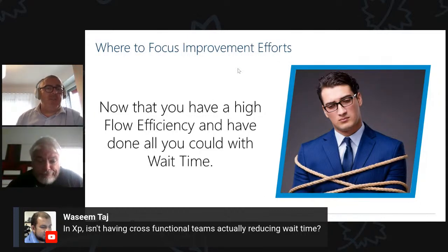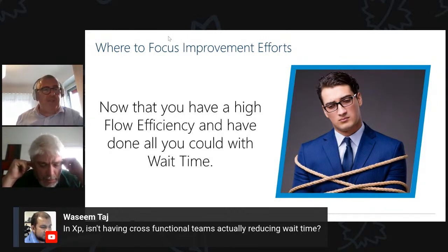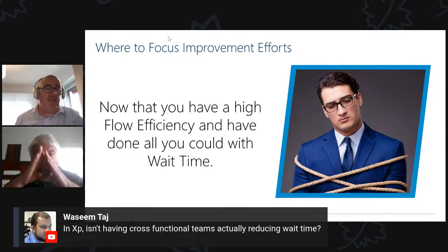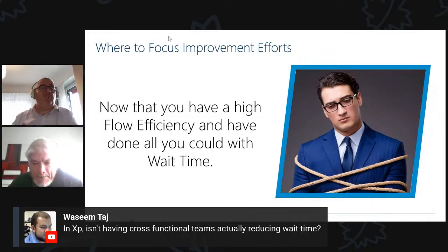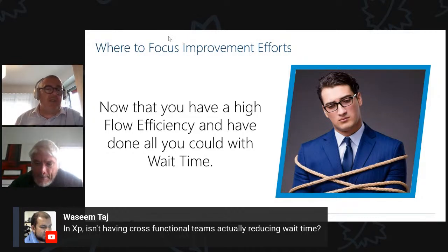Yeah, and one other thing I'd say to Wasim as well is the very first episode we did on TameFlow, we talked about Herbie, the Boy Scout. So when I'm doing work, I'm often asking, where's our Herbie right now? And if your Herbie is people waiting on other people, you can look at that, of course. Often it's slow decision making or something else. And so by looking for wherever your constraint is, and putting your effort into resolving that, that's really what we're going to get most of the improvement in the TameFlow logic anyway. Hope that answers your question.